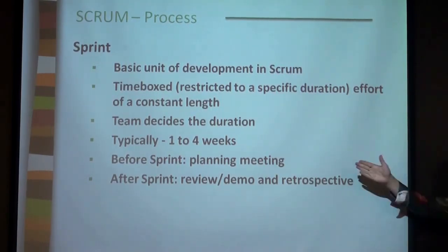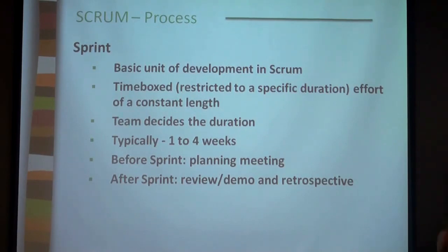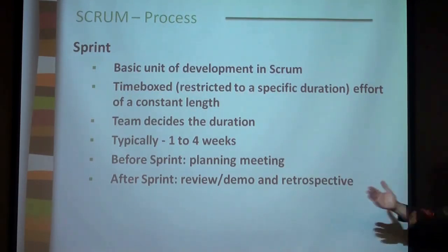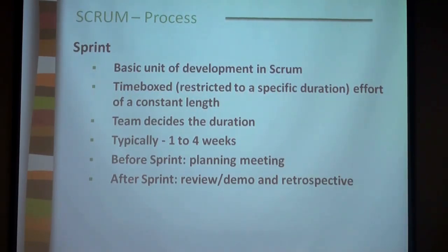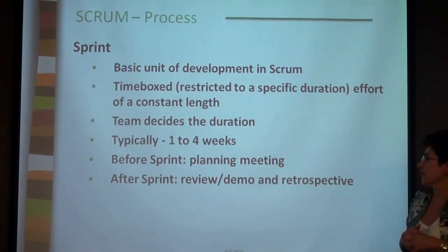So that's why people usually stick to, let's say, 4 week cycles, and they go with the cycles. If you cannot develop 5 features in 4 weeks, take 3 features, take 2 features, develop those features in 4 weeks, and then move to the next sprint. Plus, the smaller the pieces of code, the smaller the increments in size, the easier it is for QA people to test, right? So you can assess the quality, you can understand where you are with the quality, whether this piece of software is functional, and then you move forward.